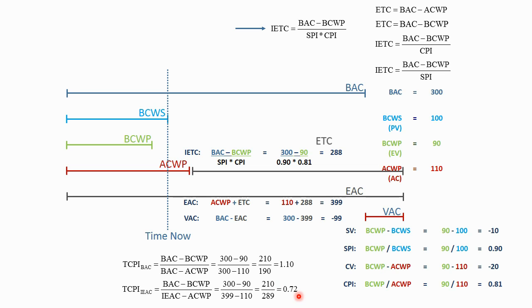Now, in some cases, if this number starts getting really low, then you would do a replan. Because obviously, the project was underestimated, the schedule was too aggressive. If the numbers get down to even below 0.5, then you probably would want to do a replan because these numbers start to be less meaningful when they get really, really low. But anyway, to get the project back on track, it's going to cost another 99.